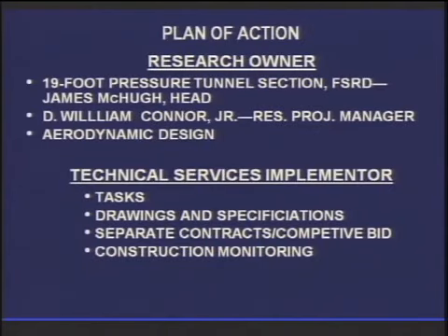Technical service was to develop a set of drawings and specifications for each one of these tasks and then put it out for bid. Now, how detailed the drawings and specifications were would depend on the job. For the motor, they would just specify, hey, it's got to fit into this space and has to have these kinds of capabilities.